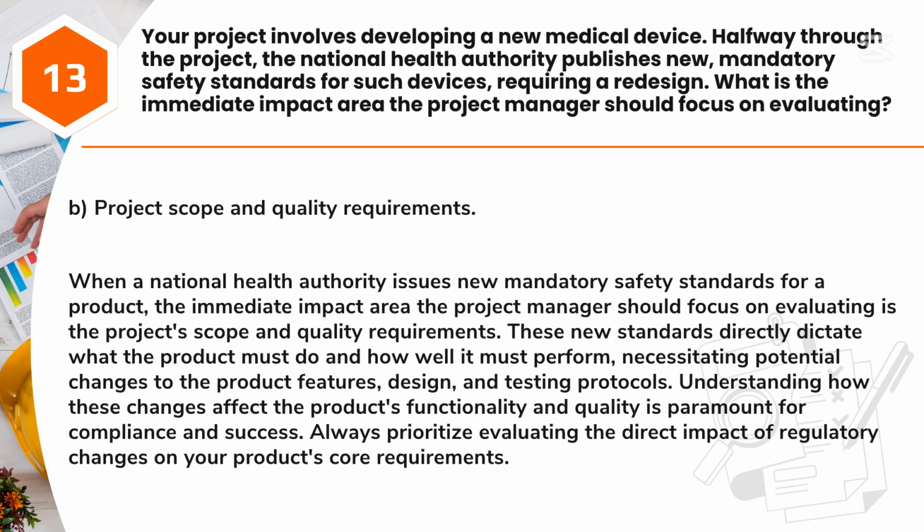Answer: B. Project scope and quality requirements. When a national health authority issues new mandatory safety standards for a product, the immediate impact area the project manager should focus on evaluating is the project's scope and quality requirements.